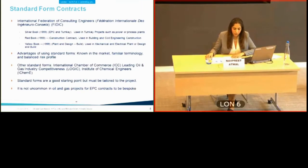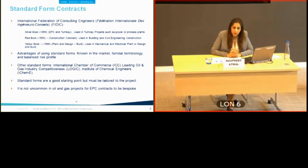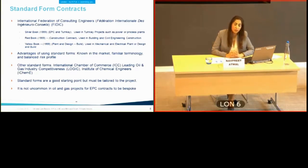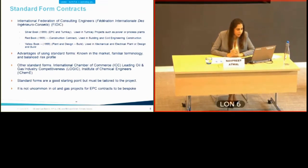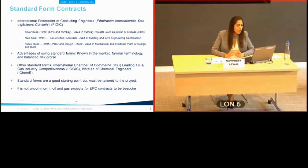The well-known international standard form of construction contract in oil and gas is FIDIC, the International Federation of Consulting Engineers. The Rainbow Suite is the one used, with different contracting methods allocated colours: the silver book is the turnkey EPC conditions used in power and process plants; the red book is for building and civil engineering; and the yellow book is for design and build in mechanical and electrical plant.